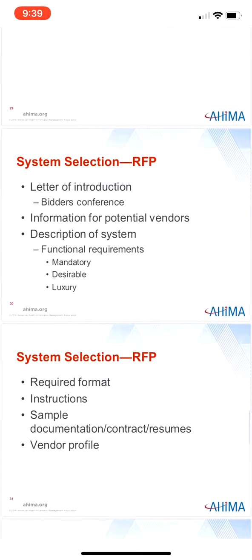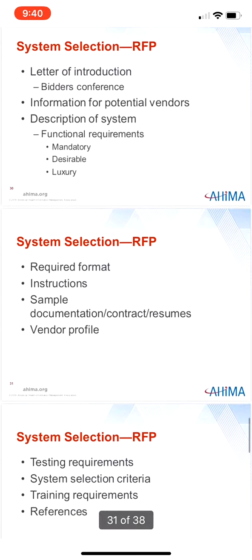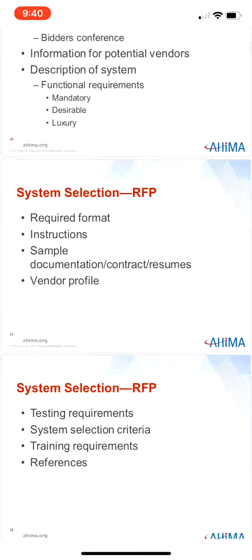The RFP is a much more detailed document than the RFI and is critical in the selection process. The purpose of the RFP is to give the vendor all the information needed to propose an IS that meets the needs of the healthcare facility. Common components of the RFP include: the letter of introduction, information for potential vendors including bidders conference details, description of the healthcare facility, patient or volume statistics, description of the system including technical, functional, and interface requirements, the required format of the response, instructions for the RFP, requests for sample documentation, a sample contract, a vendor profile, system testing requirements, sample resumes of implementation staff, system selection criteria, training requirements, and references. Appendix A shows a detailed template for an RFP.